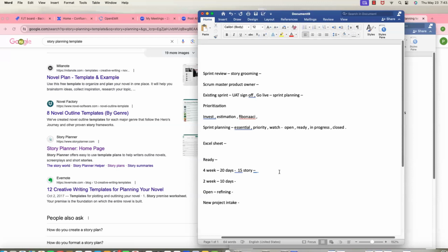But the seniors who are already there will be at their full capacity, so they must be able to take that story point. What we will do is, there are 10 people there and everybody is 15 points, and two of them are new joinees, so we are not going to assign them. Maximum the team's velocity is maybe we can take only 100 points.